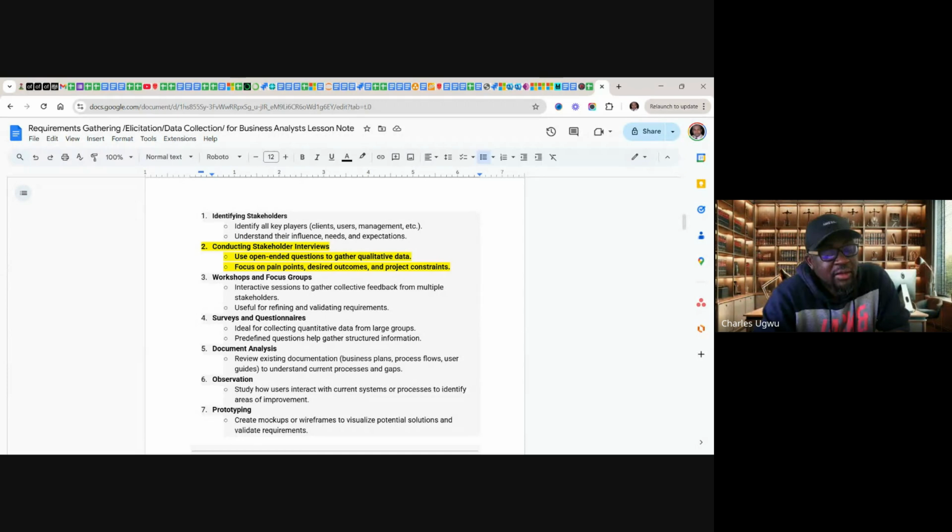If you are using an interview, use open-ended questions. It's very important to use open-ended questions, as that will help you gather enough information. Like, tell me the problems or challenges you are having within the sales department. It's open-ended. You have now tuned the sales rep like a radio, or the sales manager, and he'll start singing to you. Yeah, we are suffering in this department.